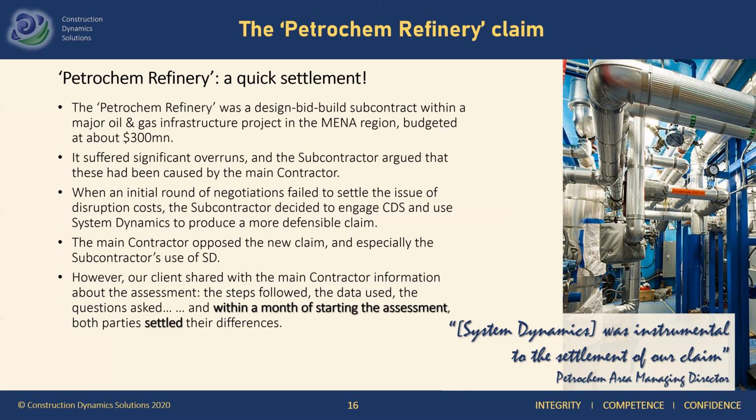However, our client was able to prove that these worries were unfounded and, moreover, started to share the information about the assessment with the main contractor, the steps being followed, the data being used, the questions being asked, so that within a month of starting the assessment, the main contractor saw the rigor and thoroughness of the assessment, and both parties reached a settlement even before the assessment was completed.